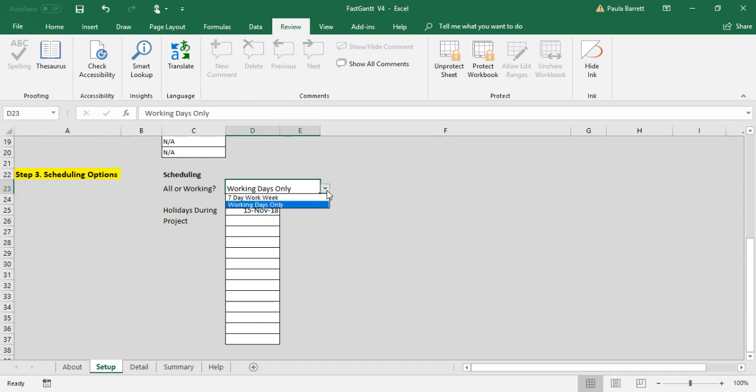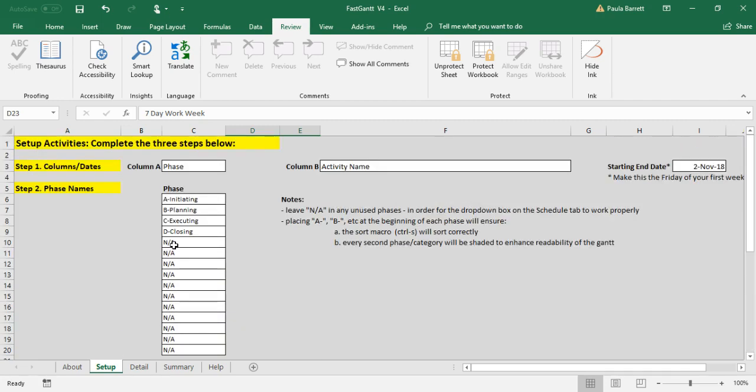The other option is you can have your FastGantt schedule seven days a week, which means that work will be scheduled every day, Monday through Friday, Saturdays and Sundays, as well as any holiday. So even if you put holiday dates in there, work will be scheduled on those dates. So that's the setup.